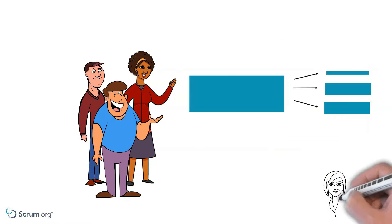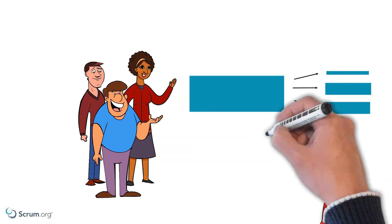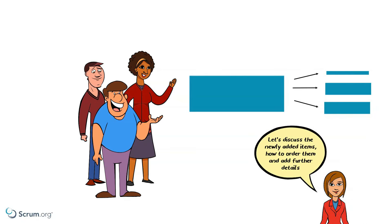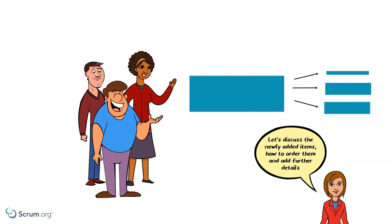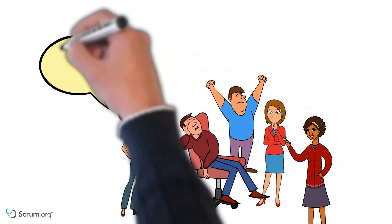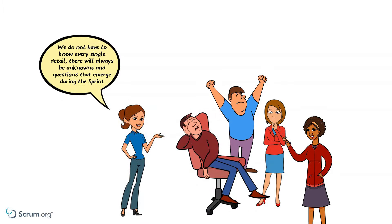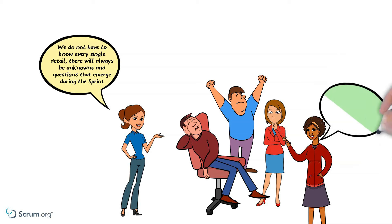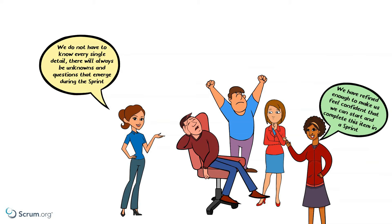Cassie suggests they discuss the order of the newly added Backlog items, add further details, and acceptance criteria. At one point, the team gets stuck into a very detailed discussion. Robin steps in and points out that it's fine that they do not know everything up front. Questions and unknowns can still emerge during the sprint. As long as they have enough information to start the Product Backlog item in the sprint, and they have sized it small enough so that they are confident they can complete the item within a sprint.